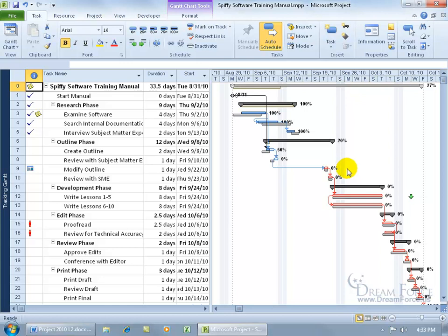And once it becomes critical, you got a critical path here that if this one becomes delayed, it pushes out the next task and then that pushes out the next one like a domino effect and eventually pushes out the project's end date and we got to finish on time.